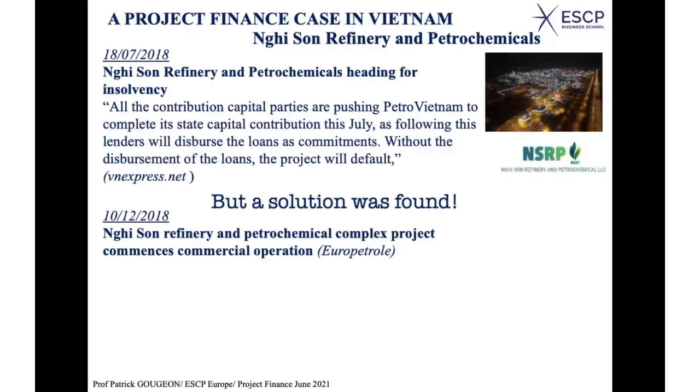About 6 months were lost just because of this type of difficulty, which is a good illustration of the lack of preparation or the, let's say, ambiguity about the objectives or whatever. So that you have discussions within the public entity, between the public participants, which might be a difficulty for, let's say, going further in the project.